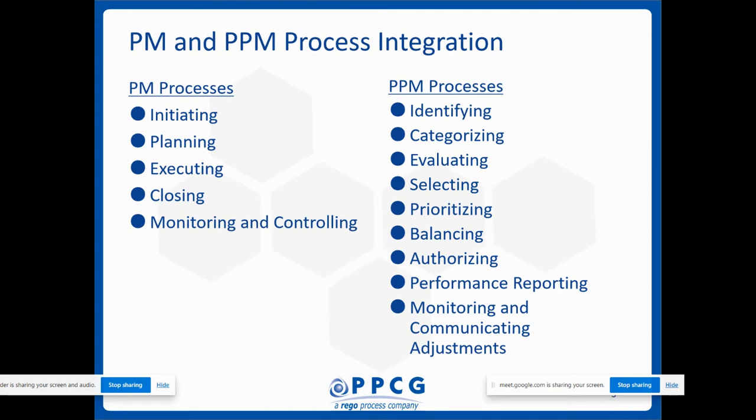So in those cases, when they want to replace a button, the project portfolio management people have to give authorization. Without their authorization, you cannot replace anything in the existing system that you have already launched. If it is necessary, they will give authorization to change. Otherwise, they won't.